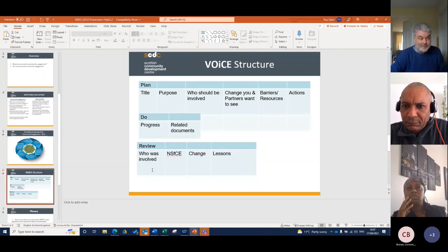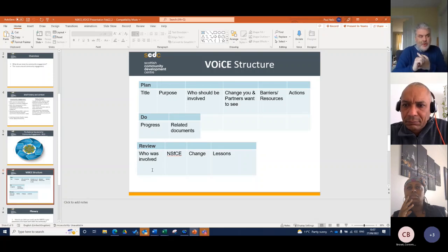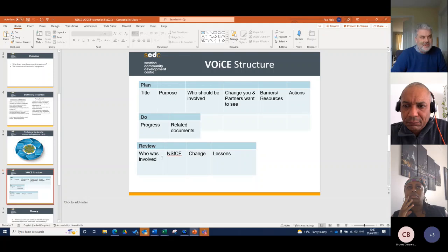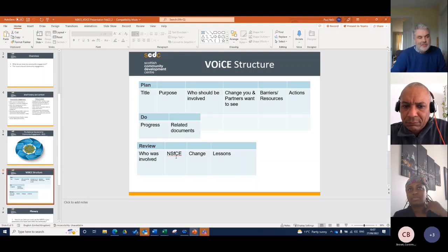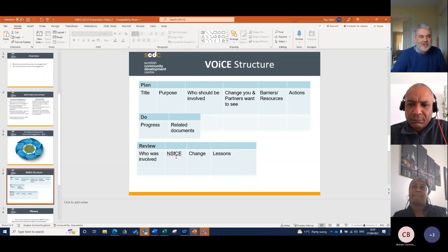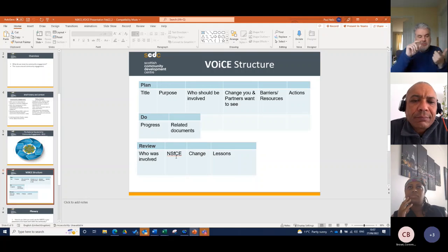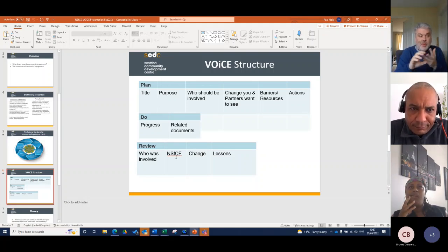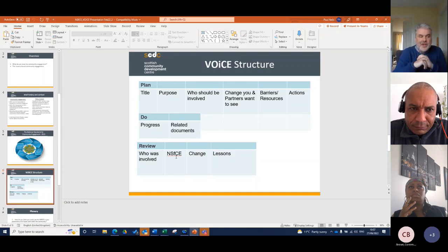And then the last bit is just closing it off. We did all of that. We've got our options paper now just about ready. Let's do the review. That's where myself and Kevin sat down and we looked at what happened. We described our meeting as Paul and Kevin met on the 25th of July to look at the engagement process around wraparound childcare. We used the principles for community engagement. We looked at them and we scored against inclusion, support, planning, communication, methods, working together. We had a discussion about each of those and we scored against that.